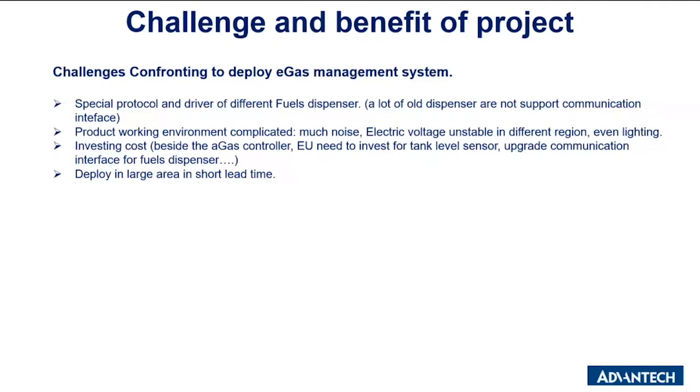I will go to the challenges first. Of course, to deploy this project, we faced a lot of challenges. First, when we deploy the special protocol and driver for the different fuel dispensers, most of the fuel dispensers are quite old, and some dispensers do not support a communication interface.